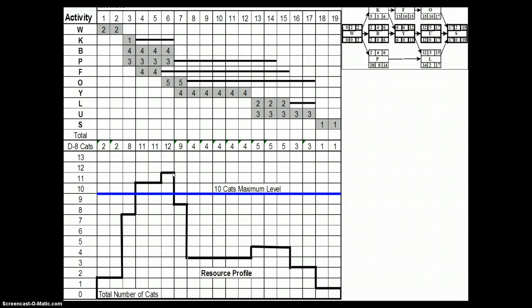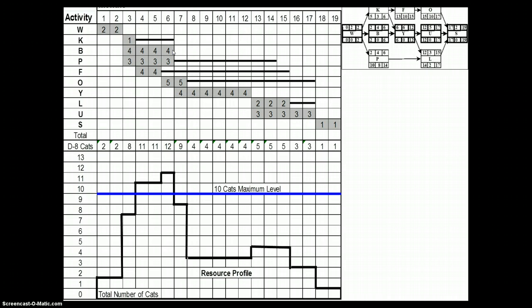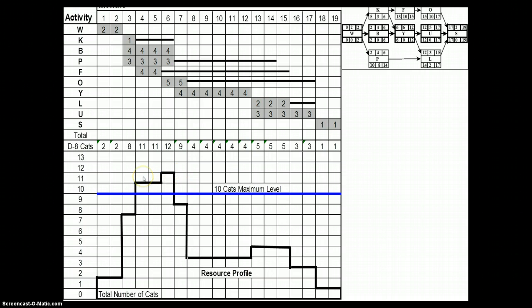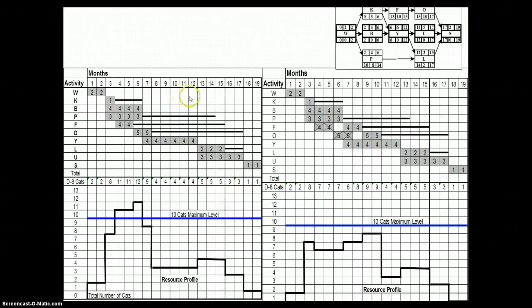We need to adjust these additional resources. There are a number of ways of doing it. We cannot do anything with activity B because it's a critical activity with no float. The other activities taking place in this resource loaded zone include activity B, activity P, and activity F.